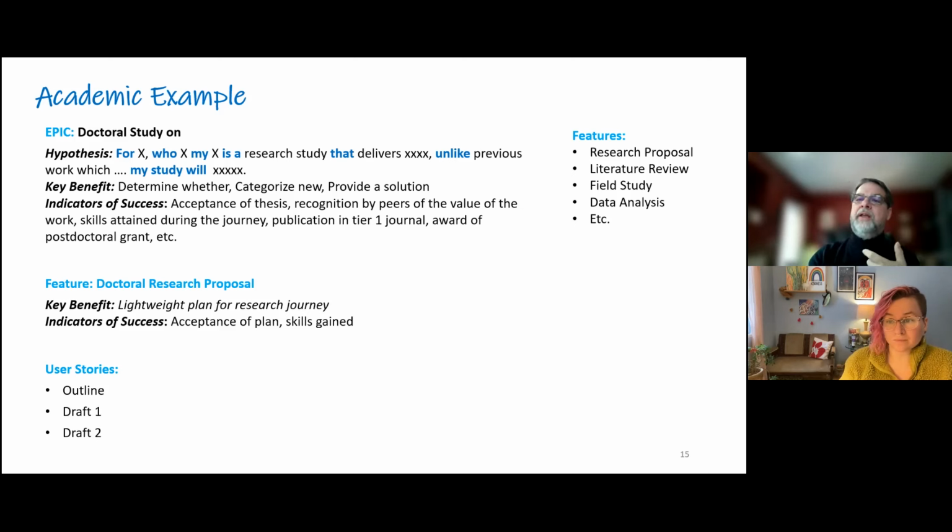However you want to break it down, into something that you can realize within a few days, certainly less than a week or two. Something where the finish line is close, proximate. You can have some urgency around it. You also can see the finish line so you don't despair or become overwhelmed, and you don't put too much on your plate at any one time.